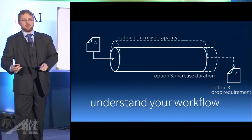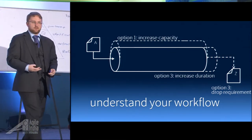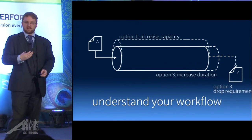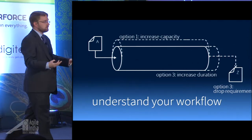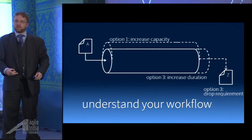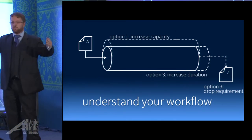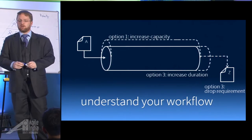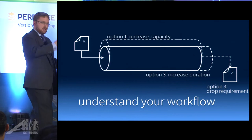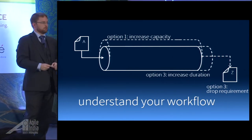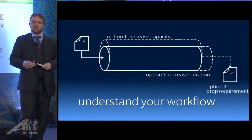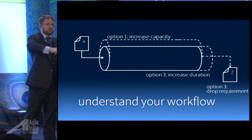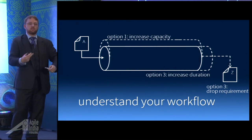When you have a team, a team has a fixed cadence more or less — I'm talking here software, services for money. Where there are capital components, this is more for operational work. When you have something that's fixed and a change occurs, you've got really only three options. This pipe is your team capacity, your team cadence. If a requirement comes in you've got three options: increase cost and add more staff. What's the problem with adding more staff? You will actually increase your short-term lead and cycle time as staff are being trained.